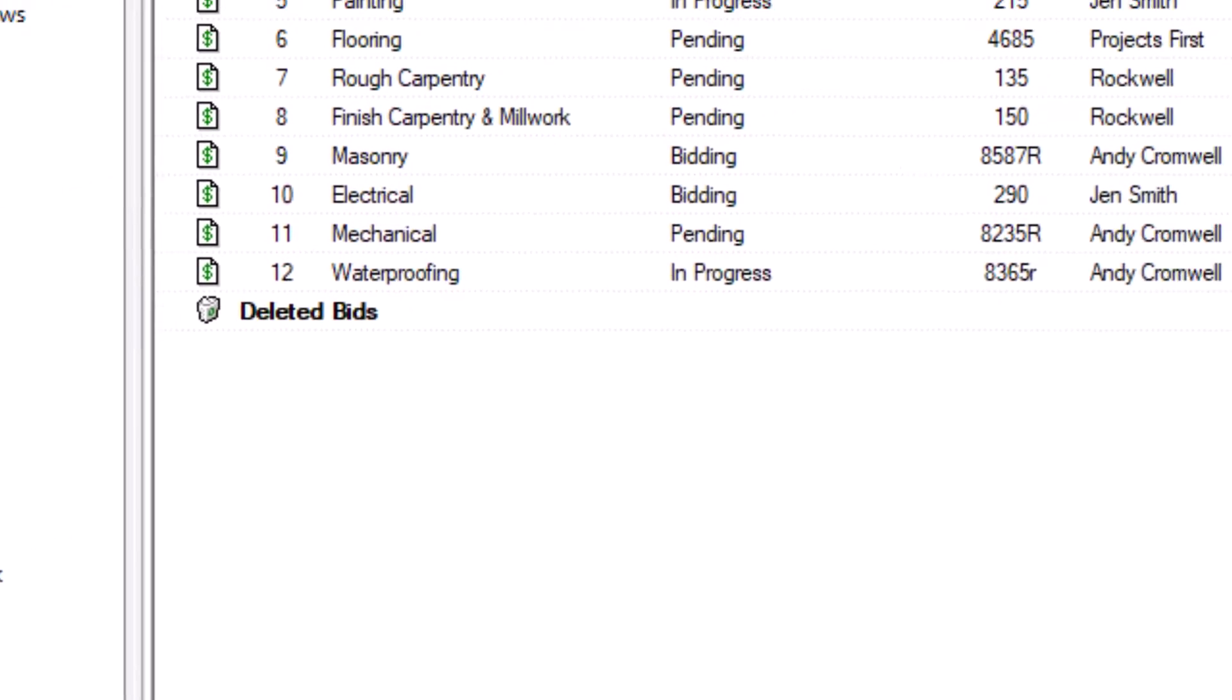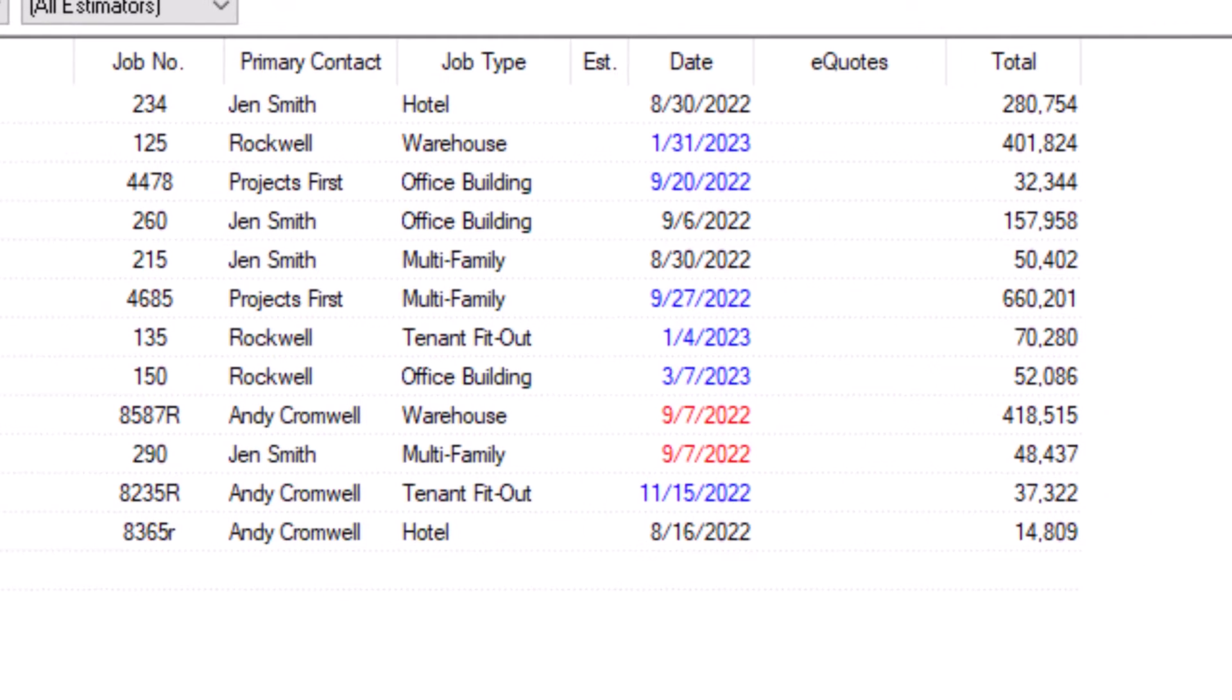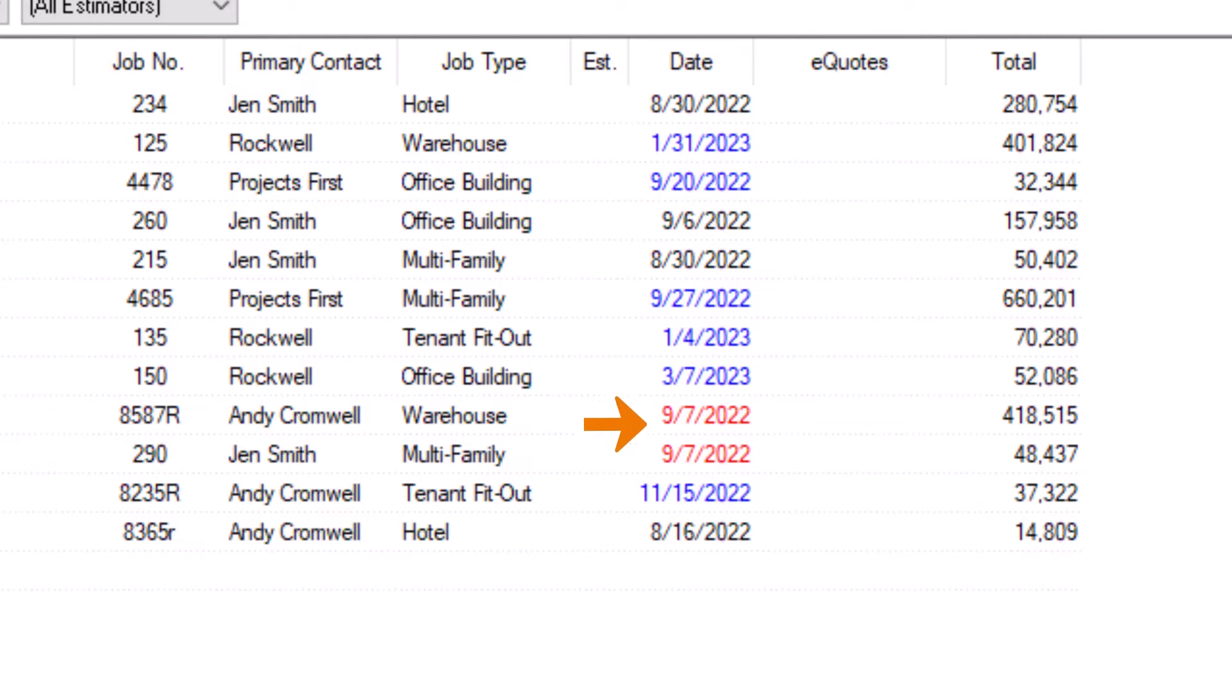Bid date colors inform you of how soon a bid is due. Blue dates aren't due for at least 24 hours. Red dates are due within 24 hours, and black dates were due more than 24 hours ago.